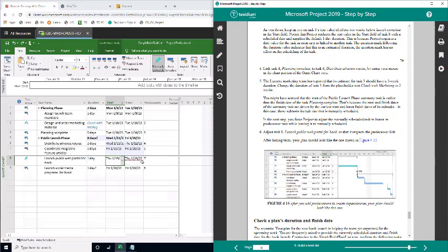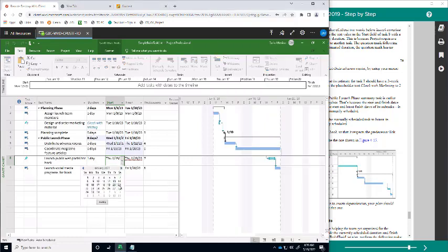So in this case, note that this task was manually scheduled, right? So that's why the dates didn't change. But really and truly, what we said before was that task 8 cannot start if task 7 has finalized. And because it's manual, we have to adjust these dates manually, right? In this case, I have to say that this task will start on the 21st, right? Which in this case is a holiday, but let's just do 23rd. And you'll see that this little red underline will just go away once I do that.